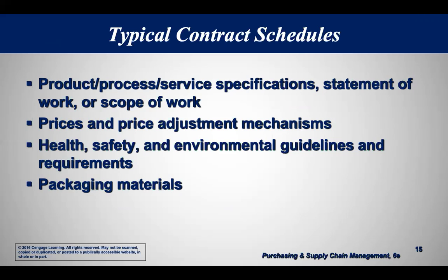And there will be an article in the front of the contract called pricing, and just say the prices for the various items are as described in Appendix B and will be adjusted in accordance with, or you just say Appendix B, and then Appendix B will have the prices, and it'll also have price adjustment, like whether the price changes every year, goes up every year, goes up with the consumer price index, or if the price is not going to stay the same through the whole contract, how will it change?